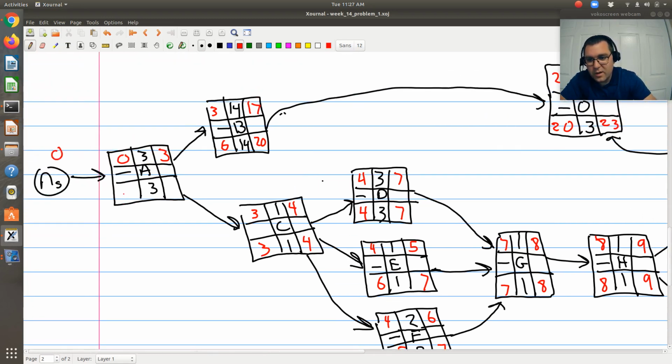All right, so now looking at A, B and C both have a precedence of A. So I'm looking at the latest possible starting time for activity B and C. So A is going to have a latest possible finishing time of day 3 to make sure C can begin on time, has a duration of 3. So that brings us back to a latest possible starting time of day 0. Right? So that checks out. Good. All right, so we got this.